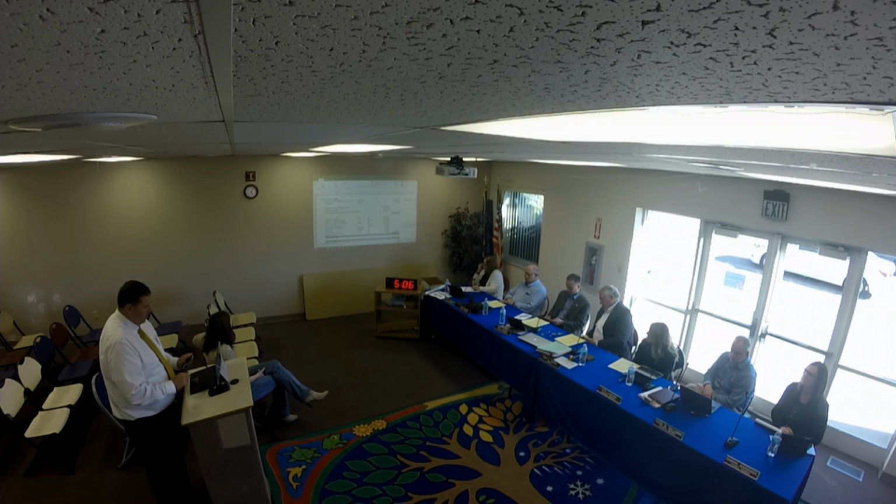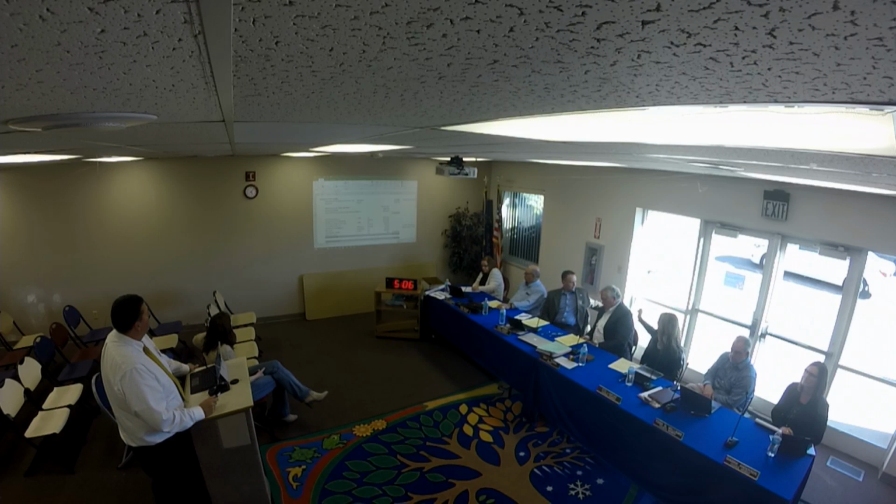What that means for our overall budget, let me talk about the expense side while we're there. On the expense side, we have $130,000. That's our allowance for the relocation of the fire department and community development. We are now paying rent for both of those departments to function in other buildings.